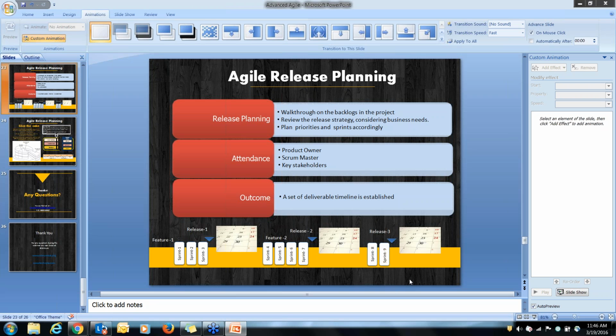So that's why when you're going with agile, it is not usually recommended that you go ahead with a fixed price contract. Because if you go with fixed price, then you have agreed that you're going to implement in agile. Hence you are bound to pick up any scope changes or any requirements which are coming in, and the cost will increase, but you have already agreed to the fixed price. So it is not advisable to go with a fixed price in agile.